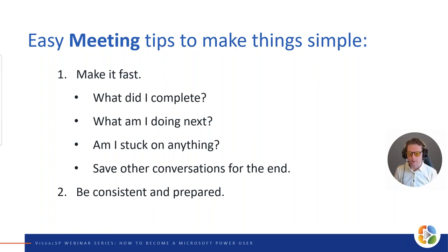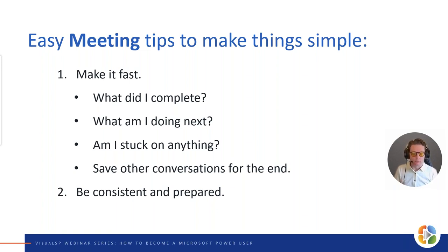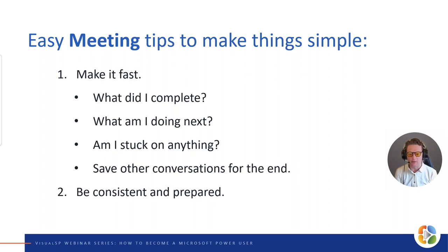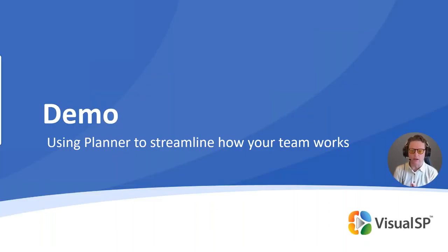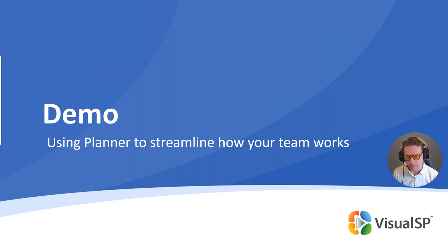That keeps the meeting quick, less intimidating, and more collaborative. Another tip: just because this is a daily informal meeting doesn't mean you shouldn't be prepared. Whether you're a scrum master or an individual contributor, be consistent and be prepared. Give a little thought before the stand-up: What did I complete? What am I doing next? Do I have tasks to add to the task board so we can document and discuss without talking in circles?